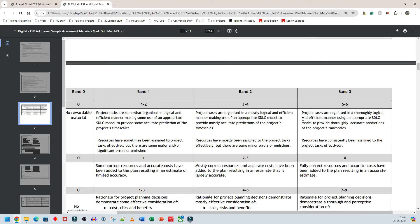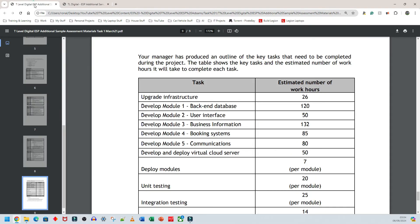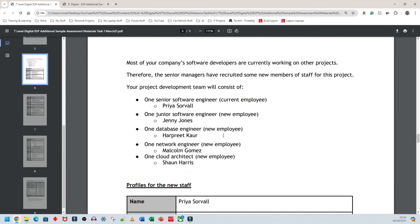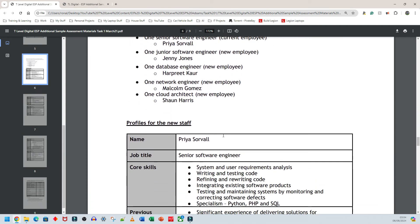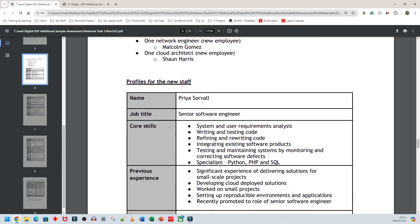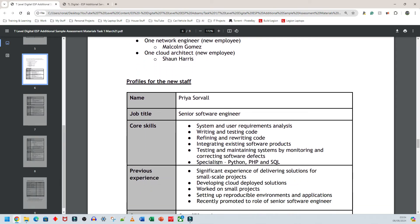There is something else that's needed that isn't actually mentioned here. You can have multiple people working on the same task at the same time. However, what you should never ever do is have someone who is not an internal employee working on a project by themselves, especially if it is a mission critical thing. I would never have an external person who is simply contracted, meaning they don't work for the company, working on my database by themselves, not having anyone else look over their work. What you should ideally have is an experienced person or a semi-experienced person working on the project. And you can have a junior person with them.